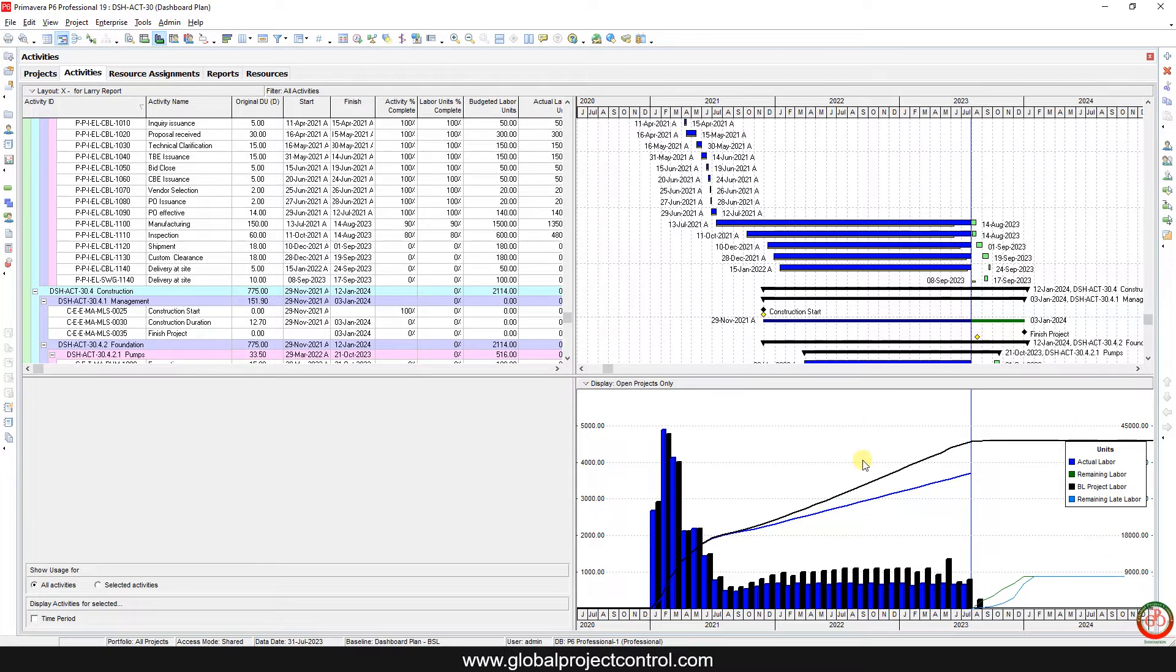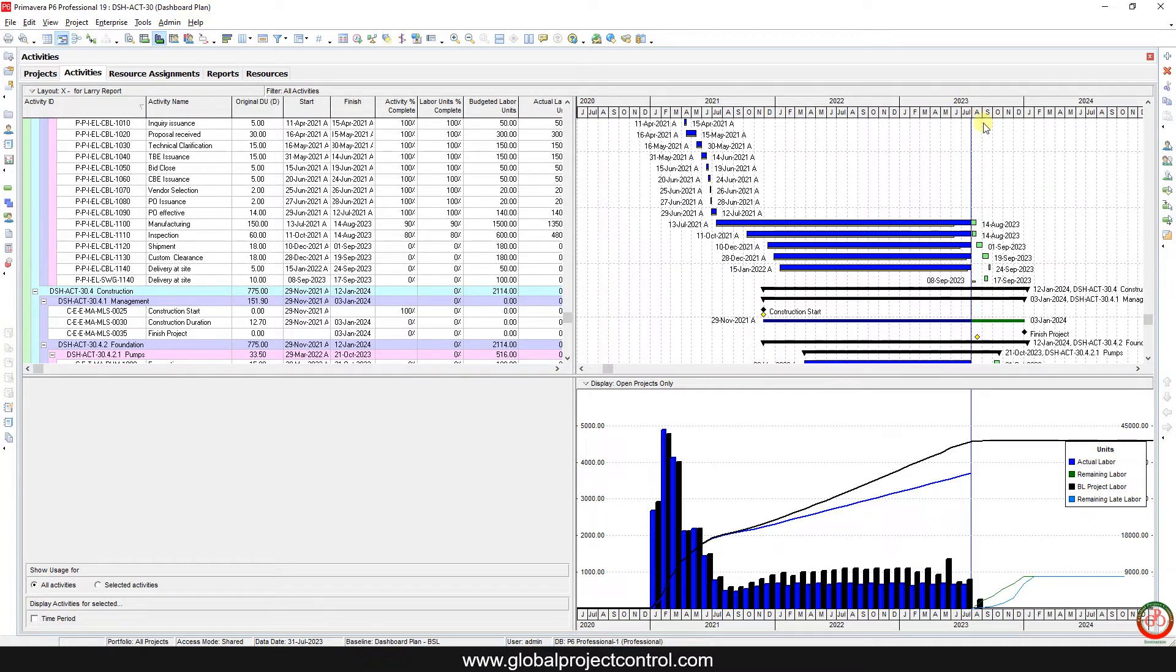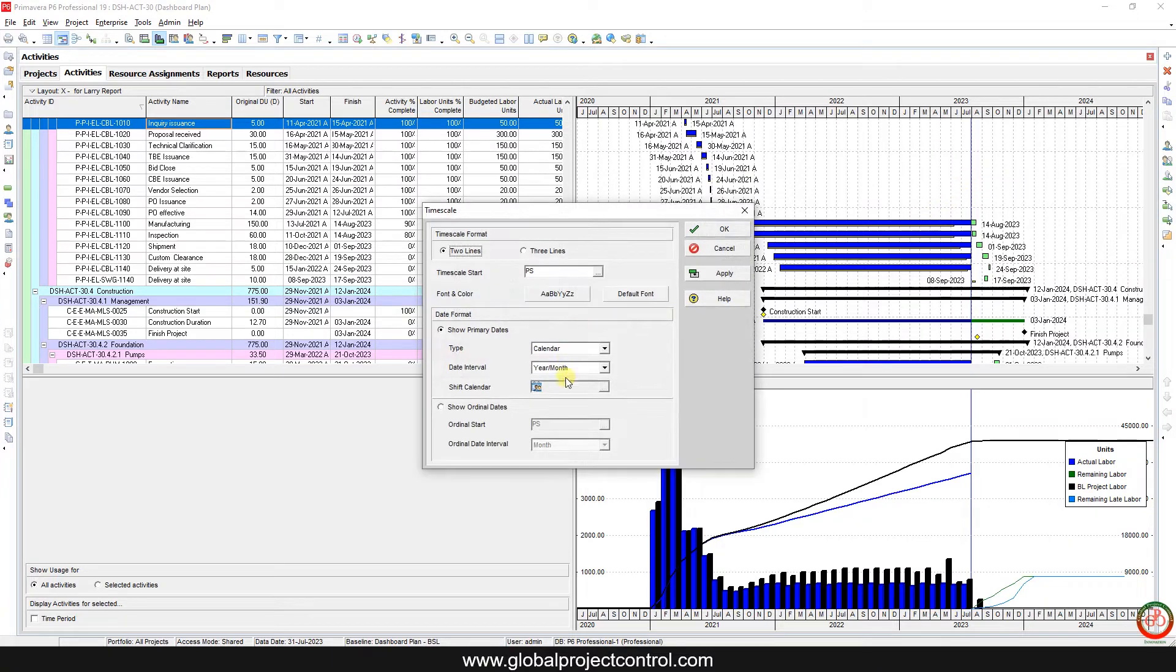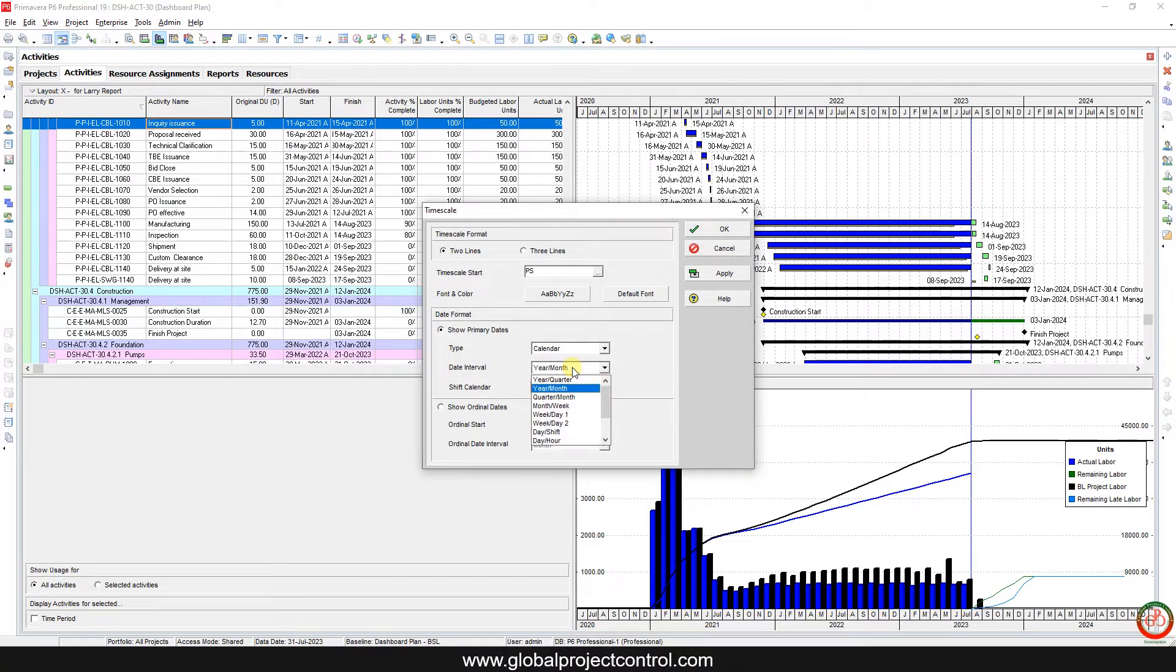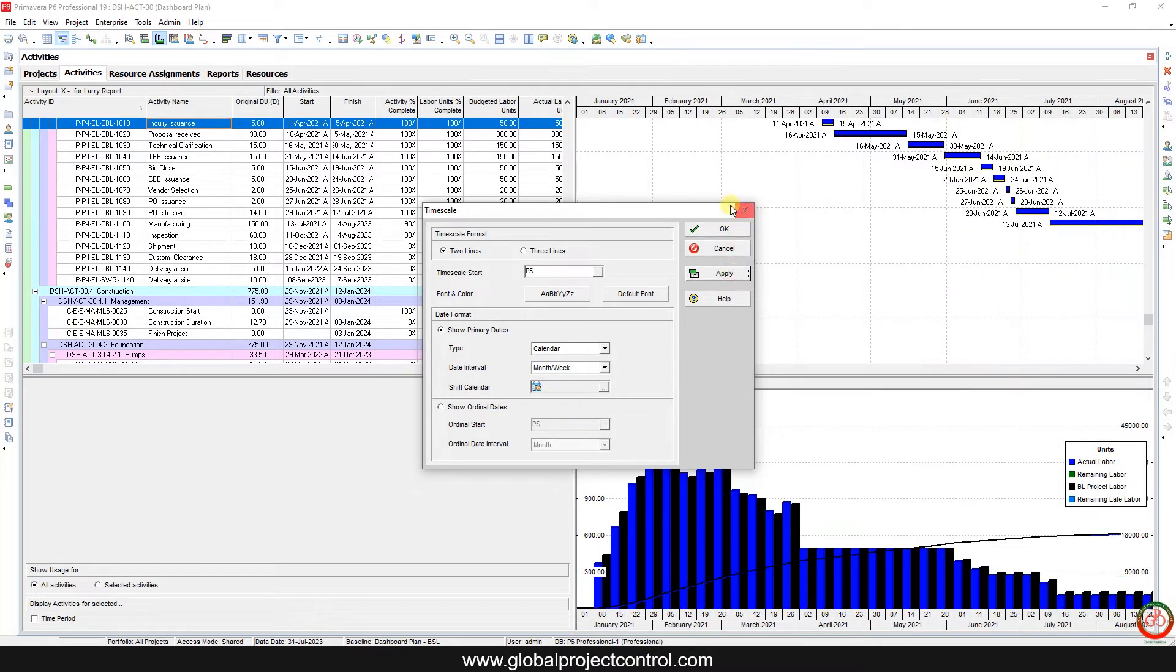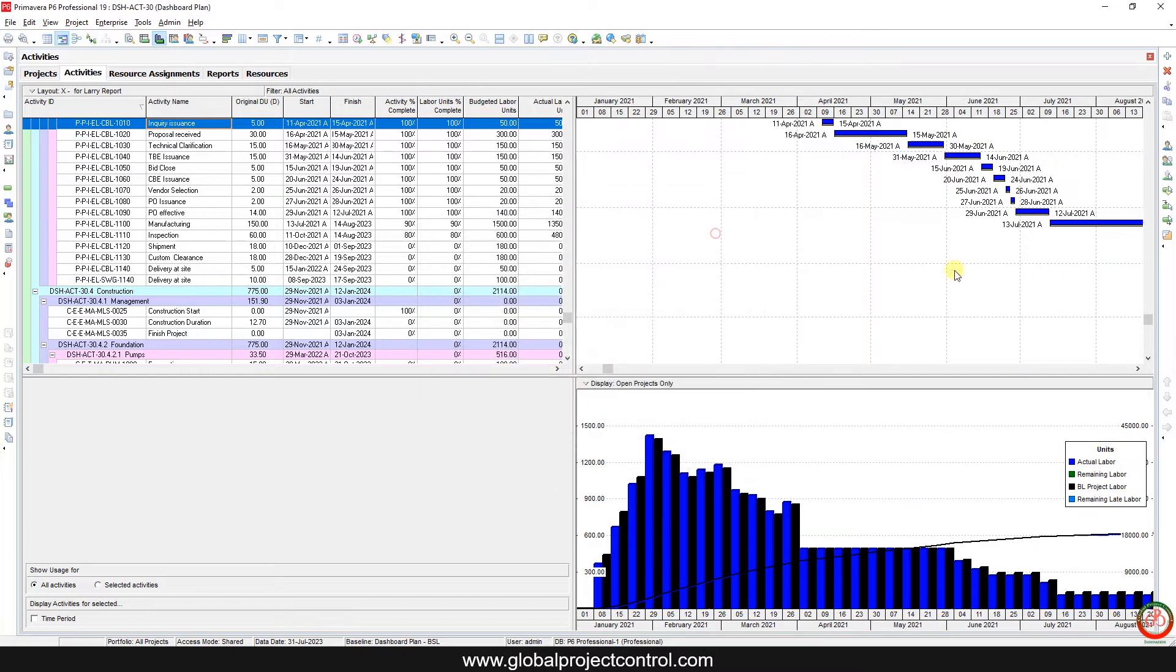The first step for look-ahead creation is you need to look at your time scale. My time scale now is the month year, it is not suitable for look-ahead plan. Most of the time we create a look-ahead plan for different time scale. For instance, the month week is a good one, so I apply it and change it to the month week.